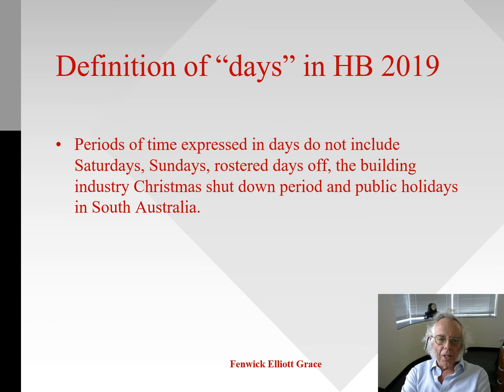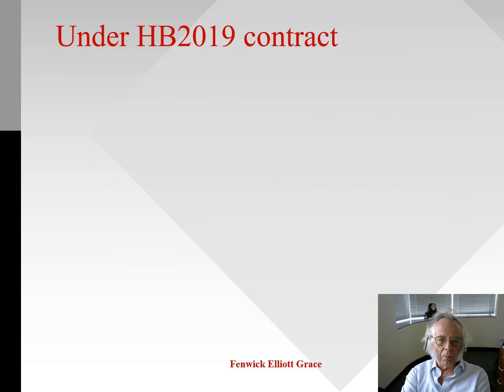I want you to note the definition of days in the HB 2019 contract. It's periods of time expressed in days, which don't include Saturdays and Sundays, rostered days off, the building industry Christmas shutdown period, and public holidays in South Australia. So be cautious when you're counting that 5-day period that you have to give under Clause 21.